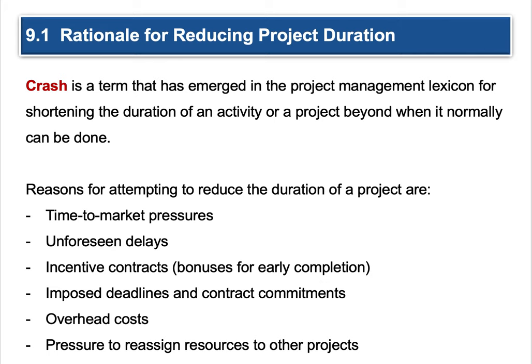The reasons for attempting to reduce the duration of a project include time-to-market pressures — they need it sooner. There might be unforeseen delays; in a post-COVID world, we all understand supply chain a little better. There might be incentives in the contract — you can get a bonus for earlier completion or a penalty for later completion. There could also be imposed deadlines, contract commitments, or extenuated overhead costs, both direct and indirect.